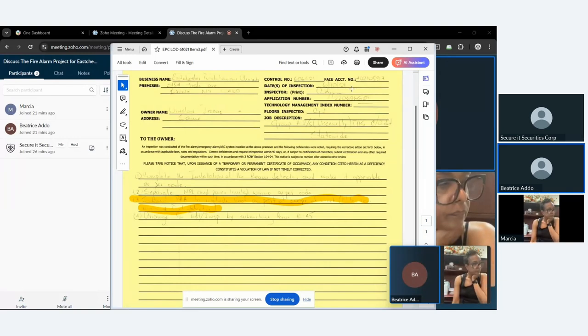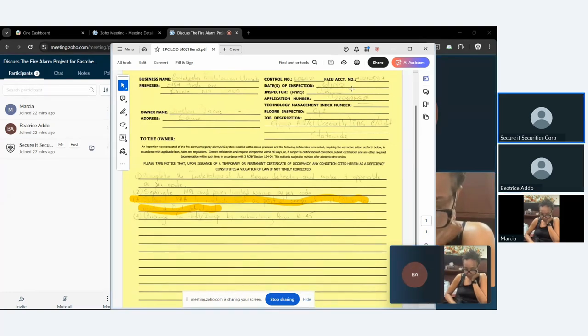If you have an engineer who already designed it and just needs to update and do the scaling, the cost comes back to the church. When we submitted for X and the inspector tells us to do Y, that's extra. The fire department approved X, but a different department came out and said they want something extra. That inspector is in the field making calls on the fly based on what he's seeing in the environment, which is why there's an extra charge.